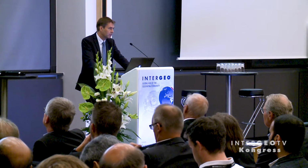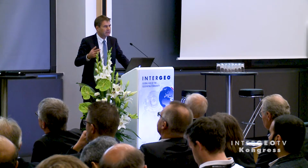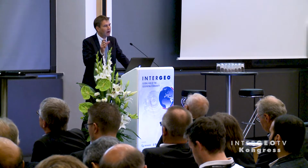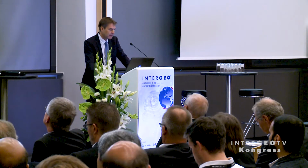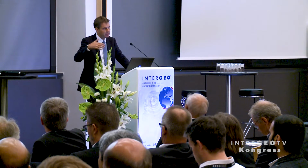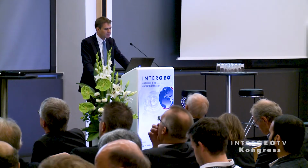That's the first thing you have to do. And you have to bring this back into the model, because what the facility manager later wants, he does not want to know if this has been built that way or that way. He wants to know how it is at the moment. So this level of detail, 500, what Ron mentioned, where you have the as-built information together with the material, with the vendor, with all these technical information behind this, that's requested at the final stage. So that's currently a field where even development is going on to automate these processes as good as possible.